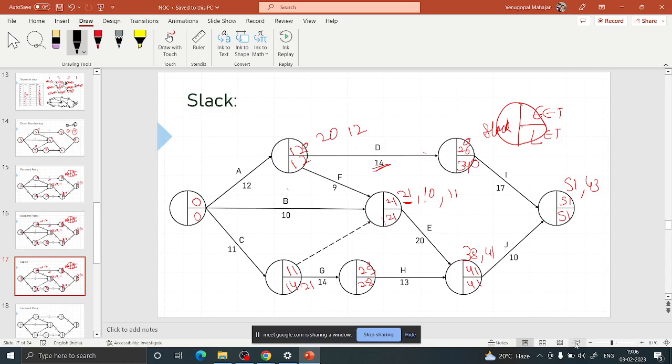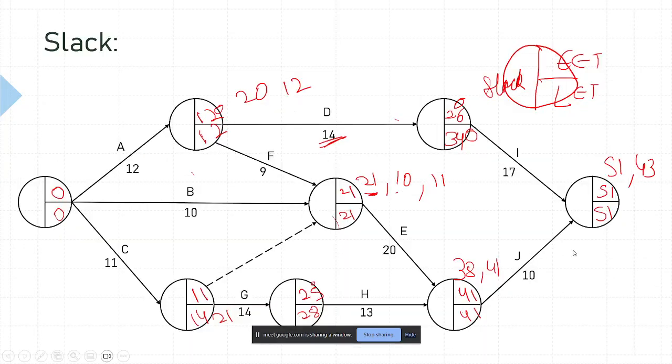Okay, why are we so concerned about delaying the activities? Like you said, if we have one event in which we have three IPAs, before completing all three IPAs we can't proceed with the next activity E. In the forward pass, activities C and B were completed, but we cannot start activity E because A and F were not completed, as they were linked.